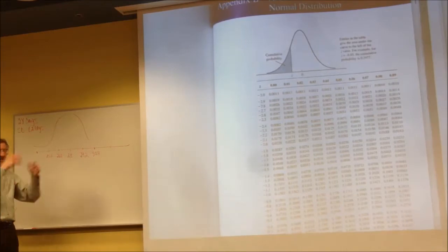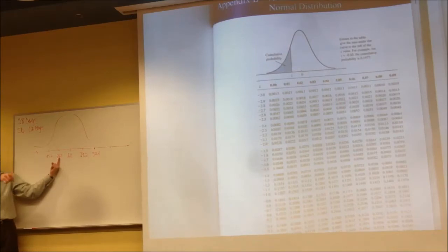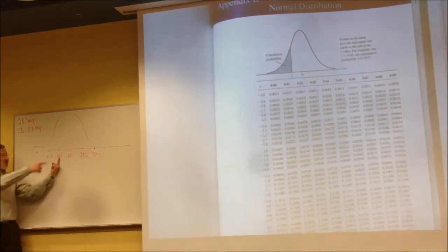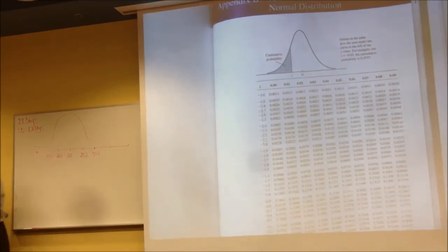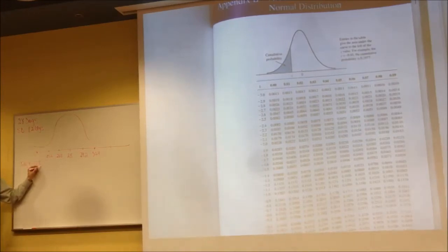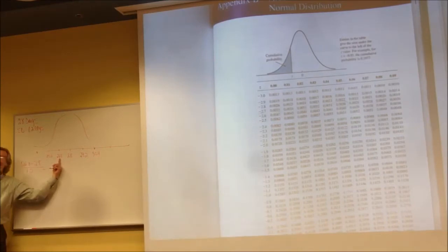But if the question's, for example, if I said the question is, what's the probability that this project will get done in 26.8 days or less? Well, that lands right at one standard deviation out. So it's always whatever you're being asked about minus whatever the expected result is, mean, divided by the standard deviation. Well, you do the math on this, it's going to be -1, because I picked a number that happens to be exactly one standard deviation below.